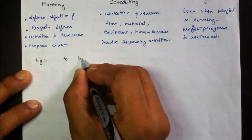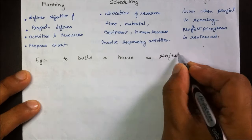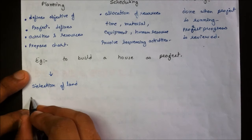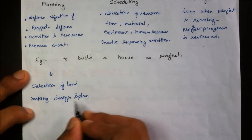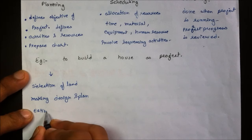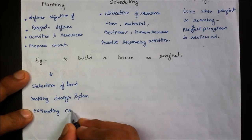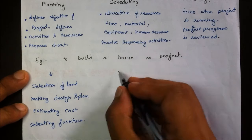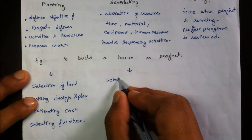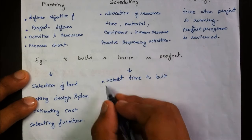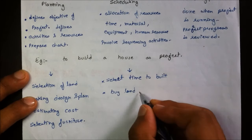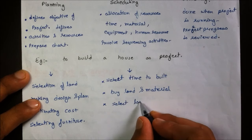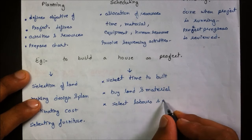For example, in a project of building a house: selection of land, making designs and plans, estimation and costing, and selecting furniture are part of planning. In scheduling, there is selection of the time or season to build the house, procurement of land and materials, and selection of laborers.